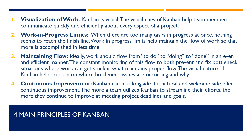The third principle is maintaining flow. Ideally, work should flow from to do, to doing, to done in an even and efficient manner. The constant monitoring of this flow to both prevent and fix bottleneck situations where work can get stuck is what maintains proper flow. The visual nature of Kanban helps zero in on where bottleneck issues are occurring and why.